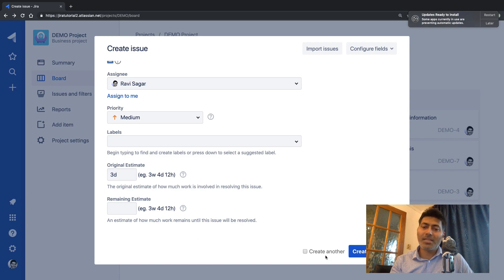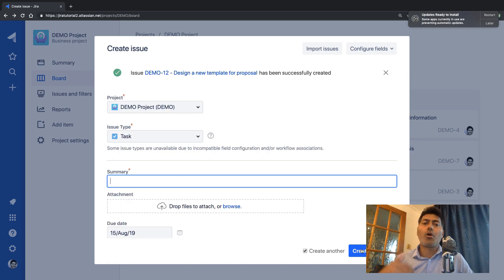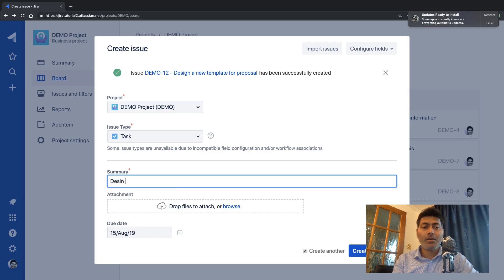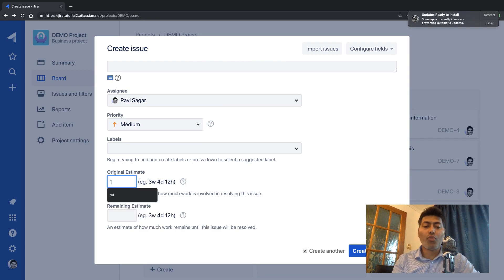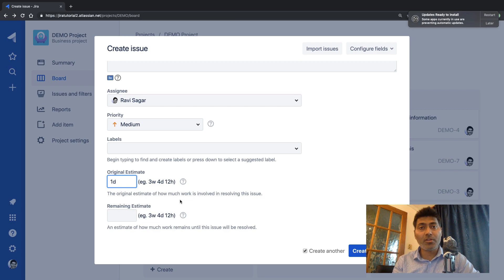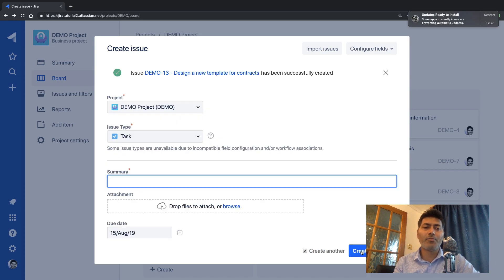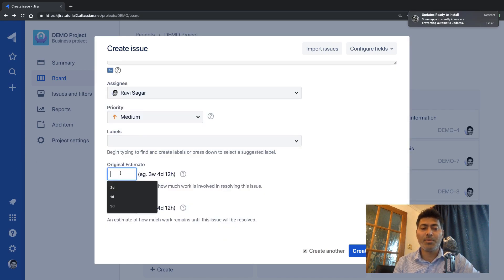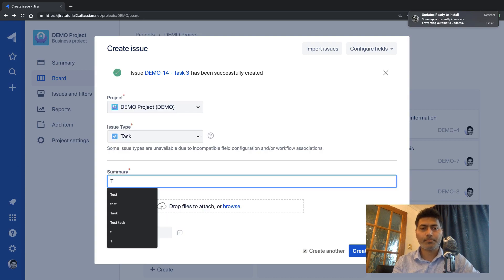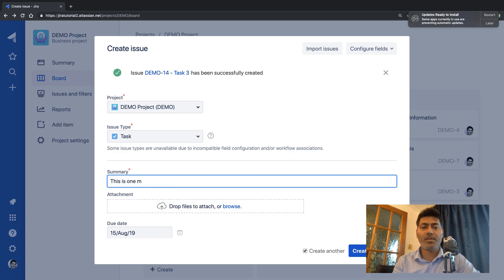Let us create a couple more issues to demonstrate time logging and reports. I'll add a task: 'Design a new template for contracts' with an original estimate of one day — one day is eight hours by default, but this can be changed depending on your working hours. Let me also create task two with an original estimate of four days, and one more task after that.